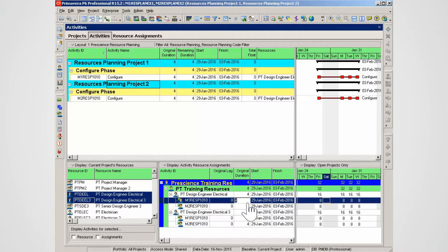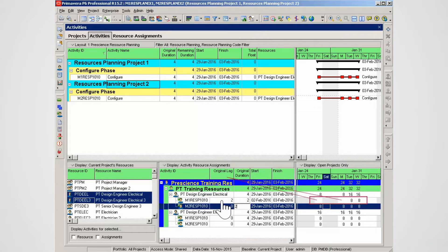Step one is to reduce each resource's original duration by half. Change the original duration for resource one to two days. To move the time phasing of work for resource one, apply two days of original lag in the original lag cell. Note that resource one only works the last two days on the four-day task — the two days of original lag has pushed the work to that point. Reduce the duration of the second activity to two days.